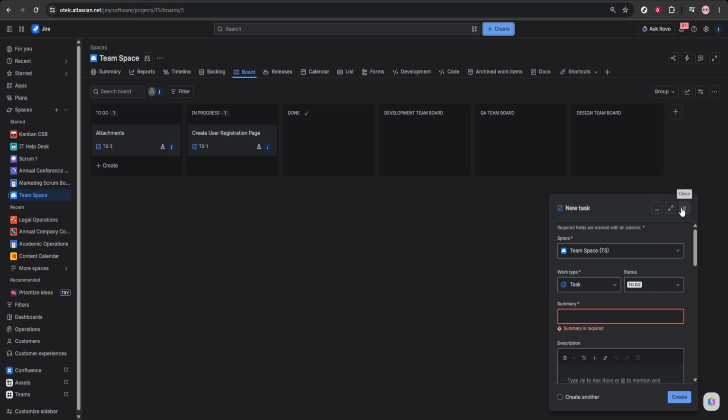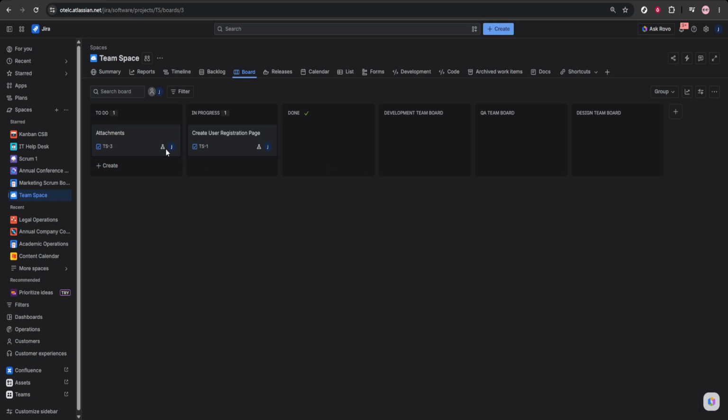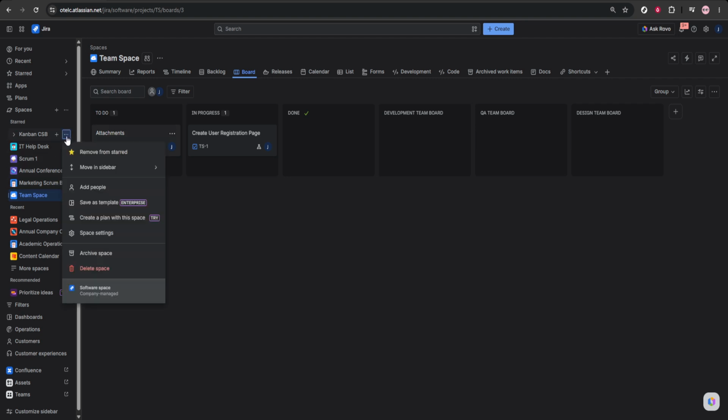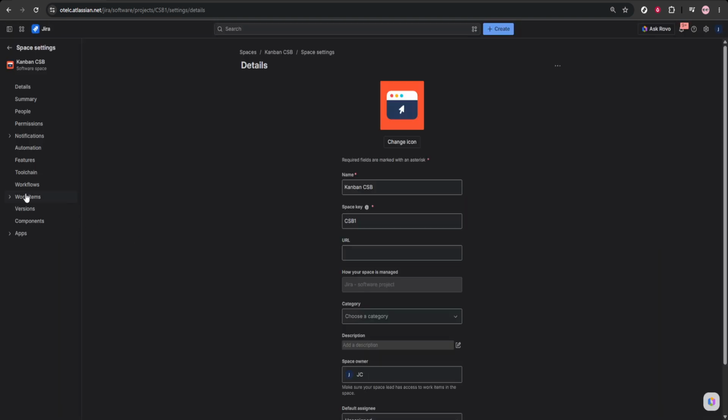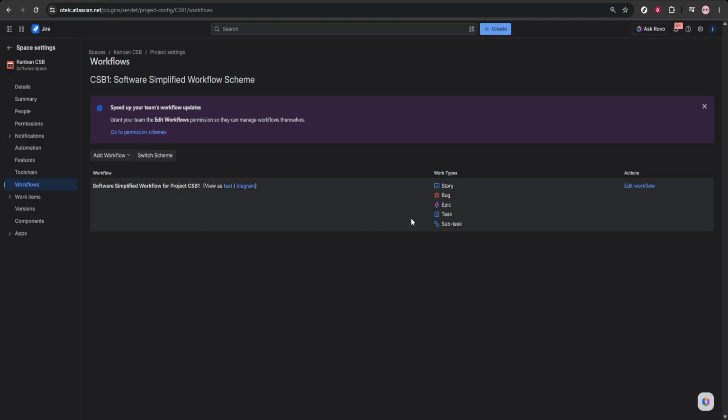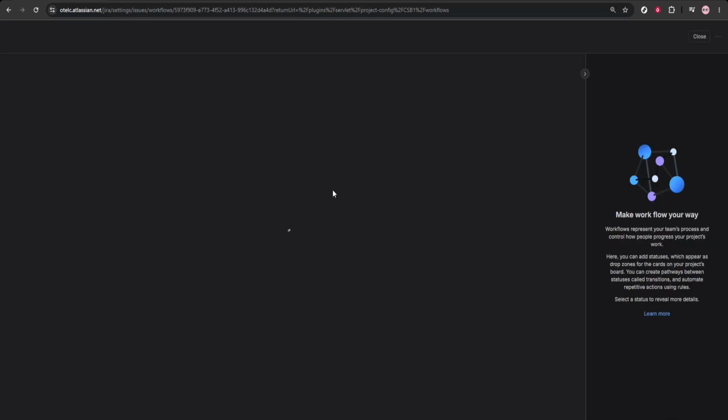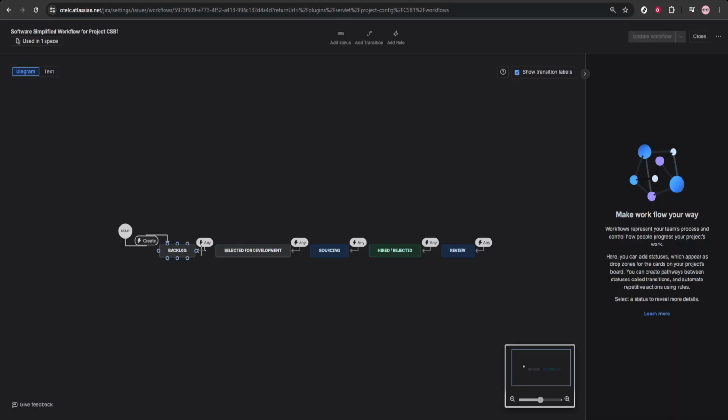Next, configure the workflow for your compliance process. In project settings, go to Workflows and create stages that reflect how work moves through review and approval. A simple structure could include open, under review, pending approval, approved, and completed. This is important because each transition becomes part of the record, helping you show that work followed a defined process.